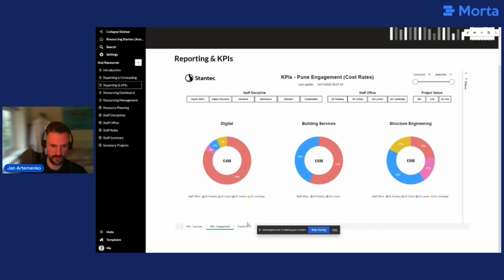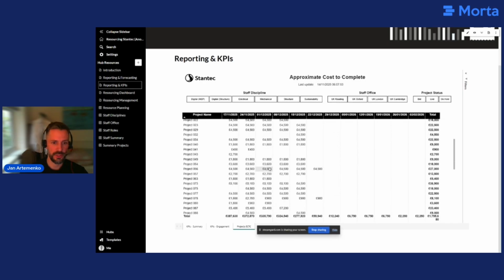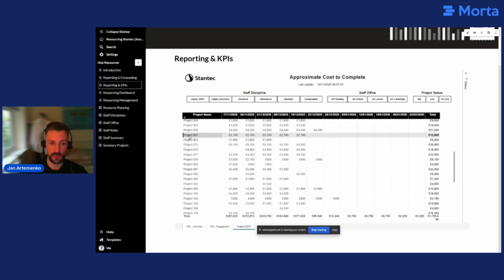And then what's really cool about that, when you put together the numbers, how much individual people cost or how much we would charge for those per hour, how many hours or how many days we would expect them to complete a project. This can give you very easy to understand fee drawdown schedule. So you can look at project 57 and we would know that to complete the project, it might cost us 13,500 on average, just under 3K a month.